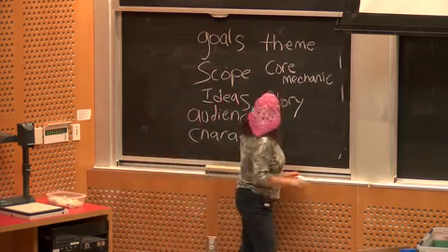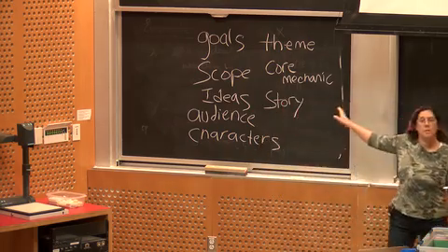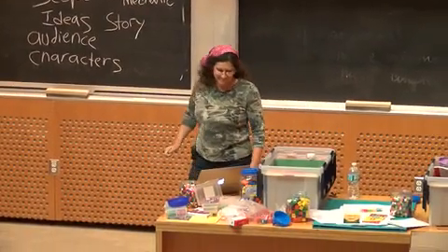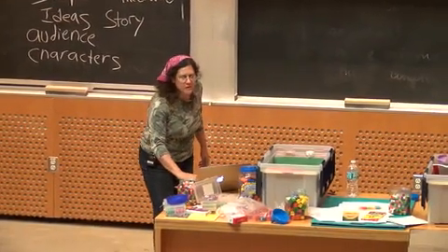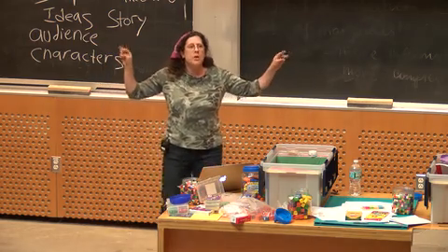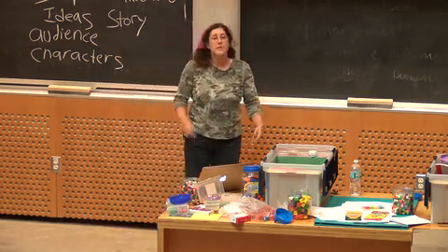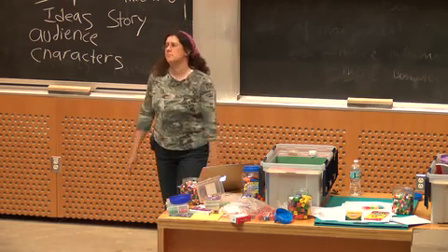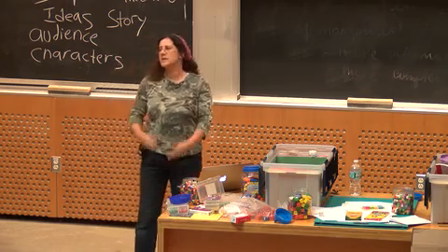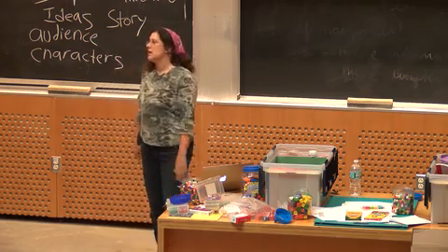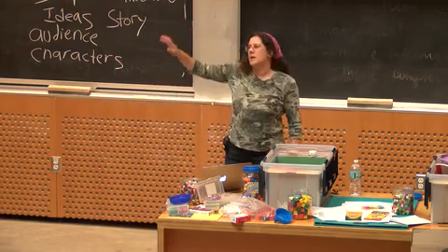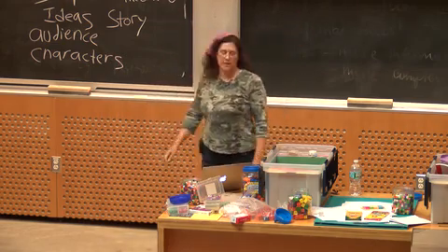The tricky part with the vision statement is trying to get most of that in on one page or less. The other thing that your vision statement may want to include, that is less relevant to the vision part of the statement and more relevant to the team, is who's working on the game. What's the name of the game? What is each person on the team going to contribute to the game? So that the vision statement becomes both a contract about what the game is going to be and what the team is going to do to get it done.